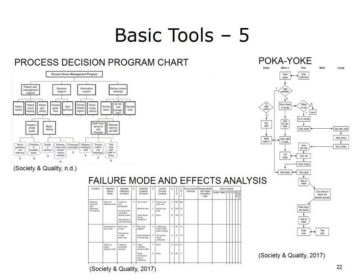The Process Decision Program Chart is a type of contingency plan that guides the efforts of a team when things do not turn out as expected. The actions to be completed are listed, then possible scenarios about problems that could occur are developed. Management decides in advance which measures will be taken to solve those problems should they occur. This chart can be helpful when a procedure is new and little or no experience is available to predict what might go wrong.